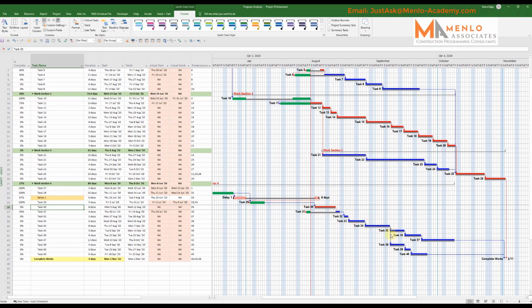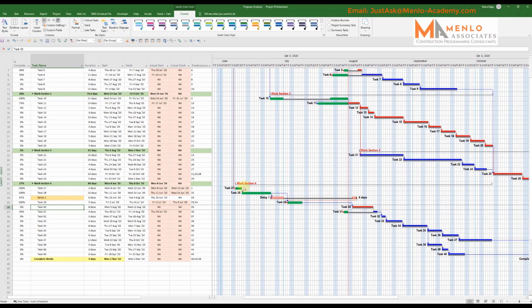The reason I do one every month is because when I'm reporting progress, I want to focus on what I want to talk about. I'm controlling the conversation with the client. If things are creating an issue over a few months and getting gradually worse, or there's a delay that's been going on for a while, I don't want them to keep bringing it up and using it as a stick to beat you for the next 6 months.